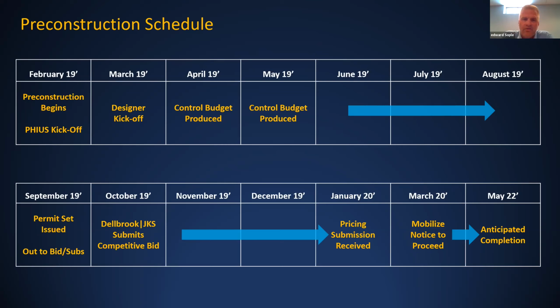And the team actually helped us understand the materials, understand the manufacturers, and get everybody's anxiousness down, get the subcontractors... The more they're confident in the products, the means and methods, their price point came down. And as we were proceeding into May and June, that number quickly went down to $1.5 million to $1 million. And then as we finalized documents into even the August timeframe, we were at the $1.5 million.